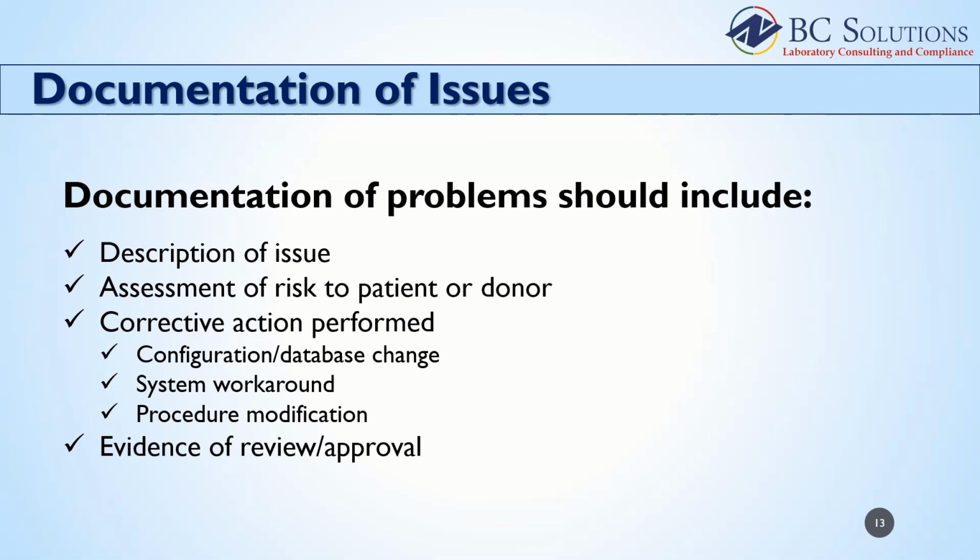Documentation should include a description of the problem. How did the issue come about? What test case were you performing at the time? You also need to perform a risk assessment or risk analysis of the problem, as we stated earlier. You want to assess if the issue could lead to harm of a patient or donor.